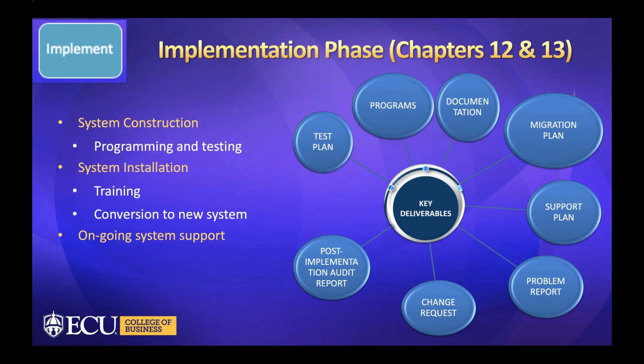The migration plan here refers to how the data is transferred from existing systems to the new system. So the data need to be cleaned up, meaning the errors will need to be removed, the multiple entries of the same data will need to be removed, and then they will need to be migrated to the new system. There needs to be a support plan for the future. Who will be the help desk staff? How will the issues be identified and fixed?